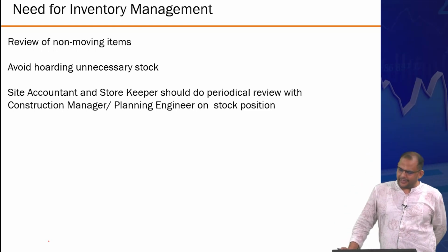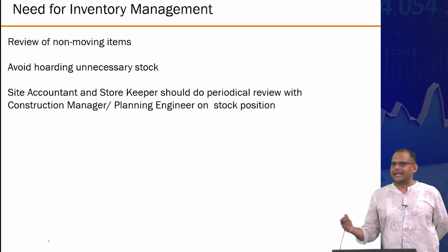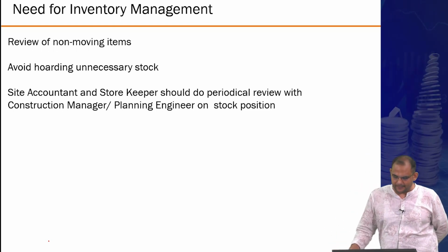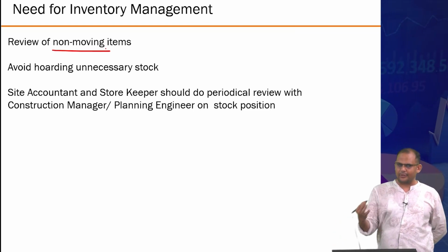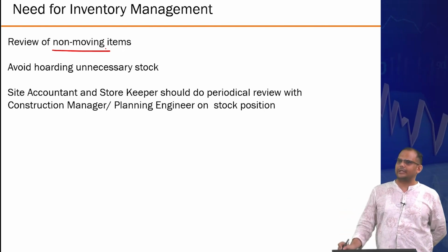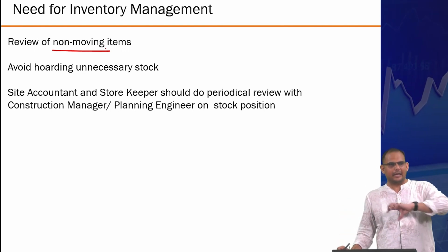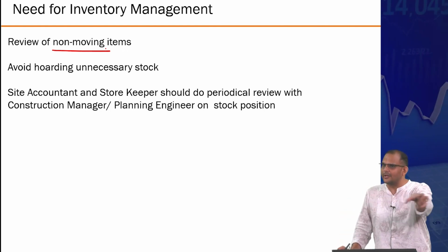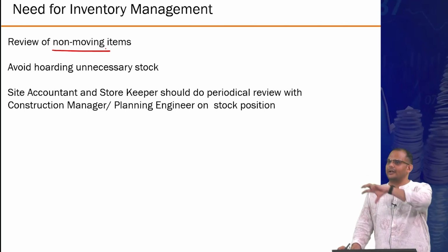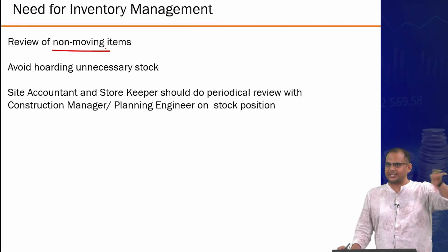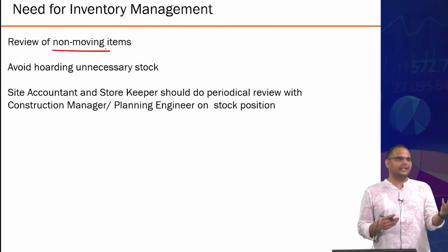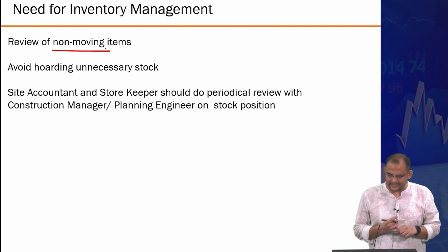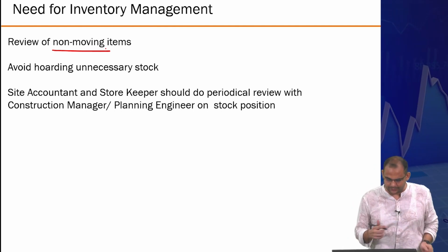In terms of inventory management, how do you, as a construction project manager, typically do it? Essentially, you need to focus on non-moving items. You need to keep on examining how they are flowing around your construction site. Are they at the right time at the right location? All the resources that they need. Are they unnecessary in your stock? Why are they not moving? So you need to be able to find the reason and make sure that the resources go there.